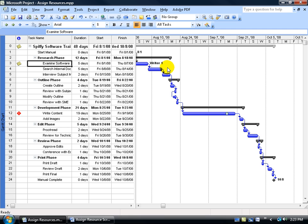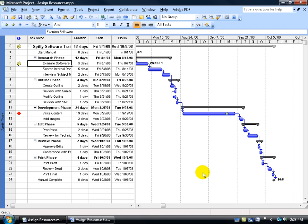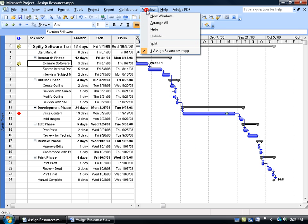Now this is one way to assign resources to your task. There is another way, or another view, and it will give me a lot more details than what I see here. And this other view is going to be a combination view. In other words, I'm going to split the window into two panes. The top pane is going to be my Gantt chart. The bottom pane down below is going to be my resource view. To get that combination view, you just need to split your window. Just come up here and click on the Windows menu, and go down and select Split.